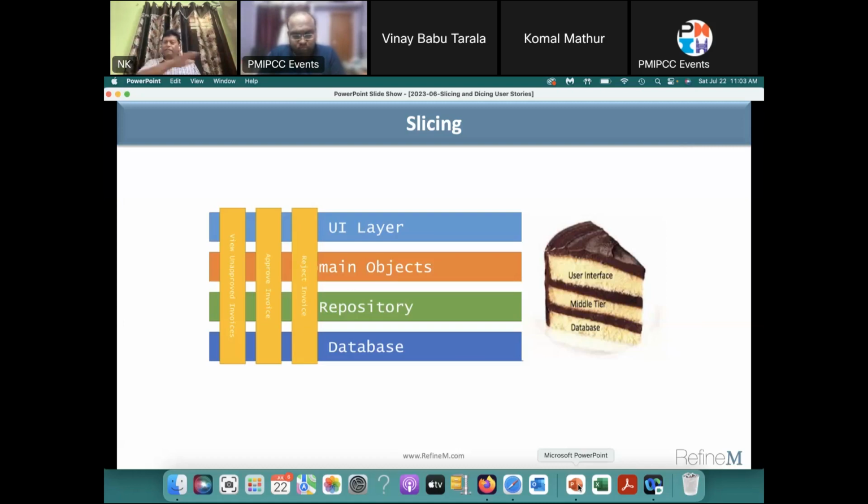not across layers. If you are doing layers, you are dividing a story into tasks, and then your story will go from one person to the other. Normally you will say, okay, here is a database guy, he will do the database work, so let's create a task for him in Jira or whatever. Splitting a story into tasks is different. You may split it, but then that's not a story. Normally, in a tool like Jira, you create subtasks of a story.